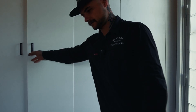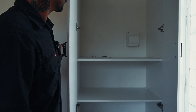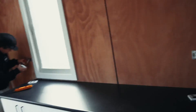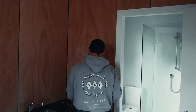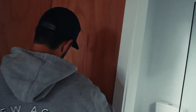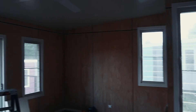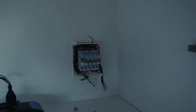The subboard should be in this cupboard. The joinery has been done wrong so it doesn't have a shelf in front of it — that's going to get changed. The thing with this job is it's all timber boards with a solar span ceiling, so the chances of someone putting a screw or nail through a cable are pretty high. You can see all the little pin holes. That's why we're doing the testing. Timber the whole way — that's why we've got a few faults in a few of these cabins. Not exactly sure what they are, but it seems to be on the power circuits.